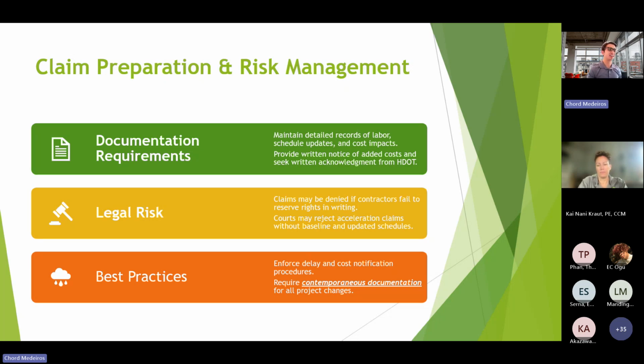Now, what is contemporaneous documentation? That is documentation created at the same time the event occurs, not after the fact, right? That is super important. And why does that matter? It provides accuracy, because details fade quickly. Documenting on the spot will reduce errors or selective memory.